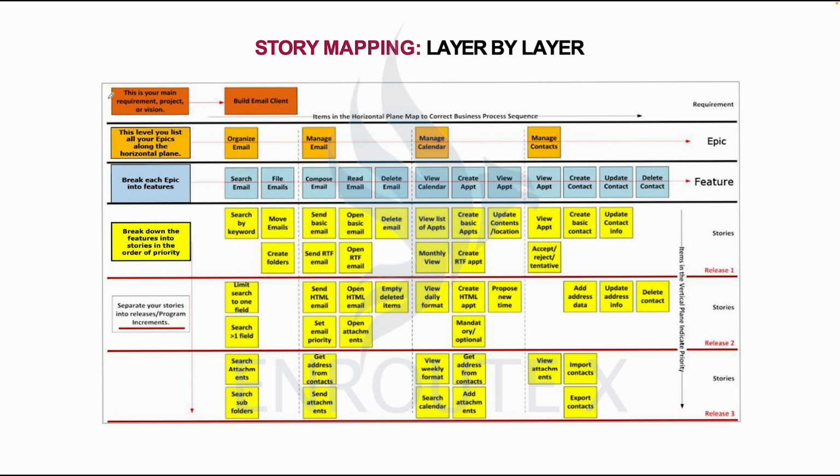So this is what we call vertical slicing. We can see the cut from top to bottom. Somebody was saying that some few years back. Top to bottom, right? We can see how it's broken down. It's decomposed from the product or service to epics, to features, to stories.